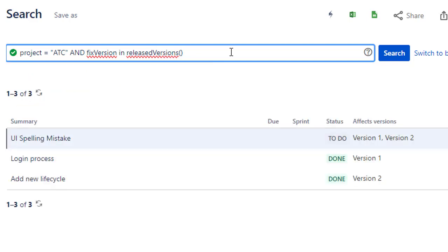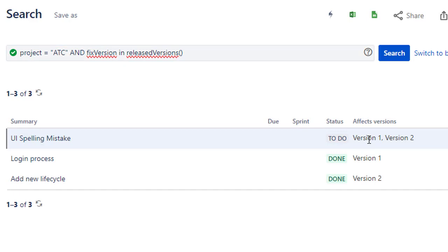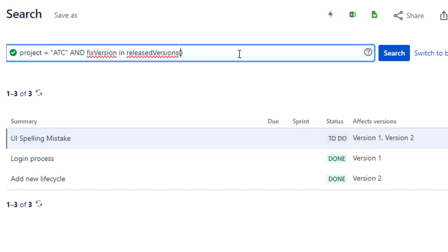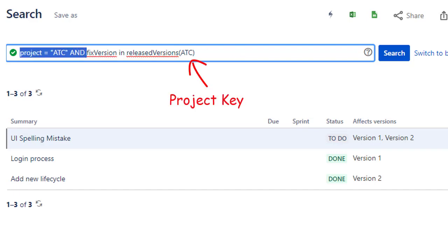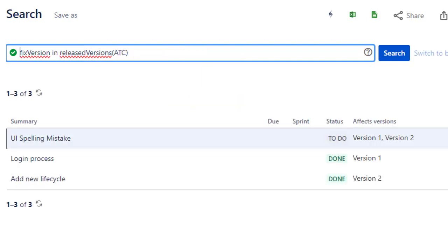That will give us all issues where the issue is fixed in a version that has been set to a release status. This function takes a project key as a parameter, so you can shorten the query using the project key in brackets.